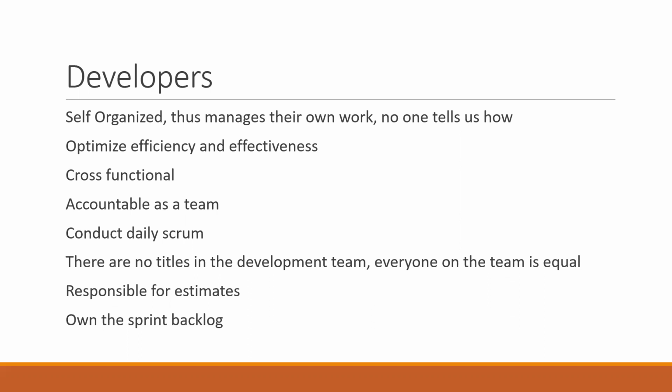Jira. Okay, Jira. The next question is that you said when you came in, you met them already in the middle of ongoing sprints, which means they've had sprints before you got there, correct? Correct. Okay, so have you tried to check the velocity history of their sprints? Have you tried to estimate how much work, as a median estimation based on the velocity metrics you're looking at, they can be taking in from sprint to sprint, based on the historical data you have seen on the velocity chart?